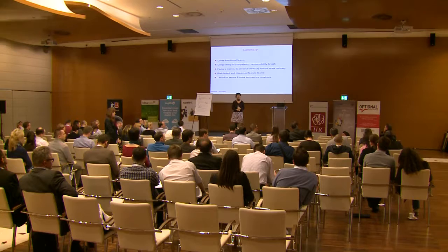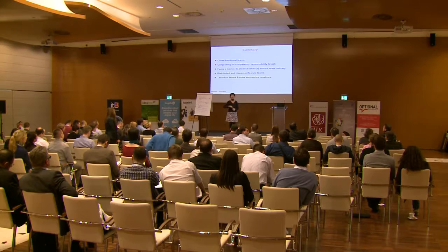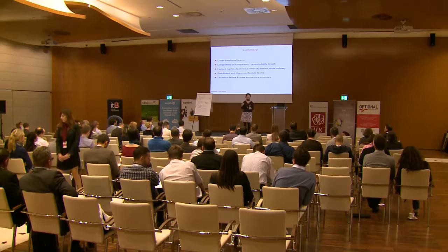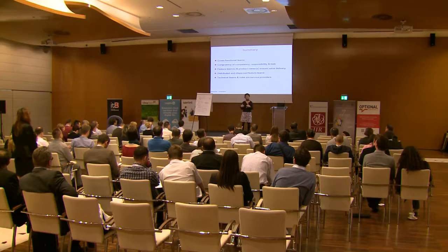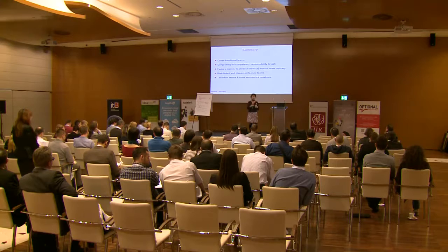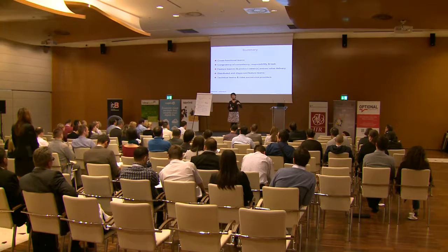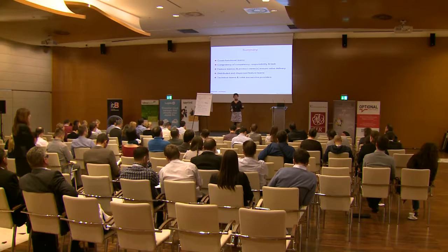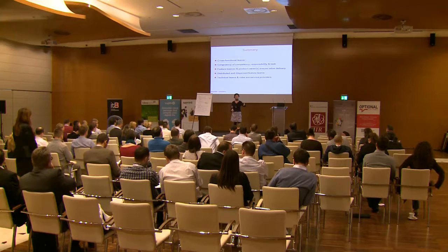So I want to repeat, first of all, I wouldn't suggest this from day one, right? If we are starting with Scrum, then it's probably not a good idea to start to take turns in the role of the Scrum Master, because we are busy learning all kinds of things. I really believe we will need the help and the support of somebody who is passionate about what Scrum is doing for us, and that's typically the Scrum Master. So you take turns once people understood what Scrum is about, and once they start taking turns, the effort put into the role of the Scrum Master should get lower and lower, because everyone understands what self-organization means. And it's not about relying on that person cleaning up after we made a mess, putting it this way.